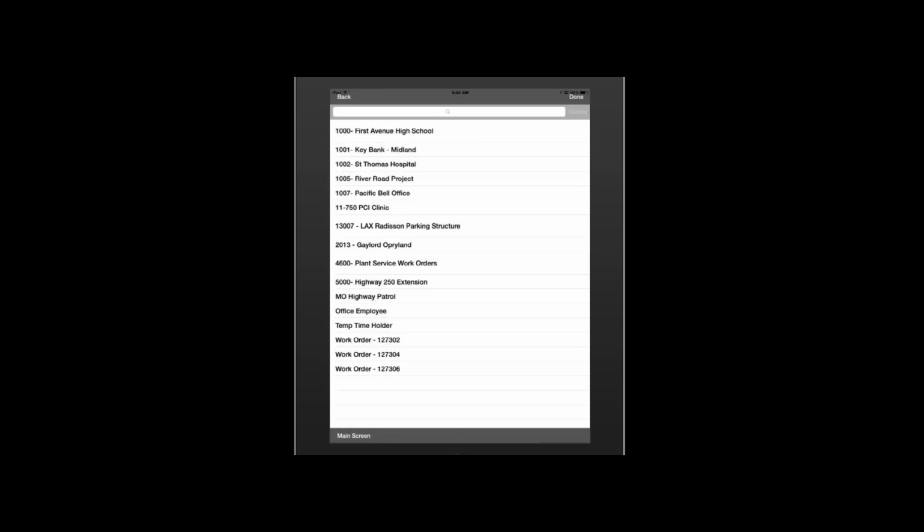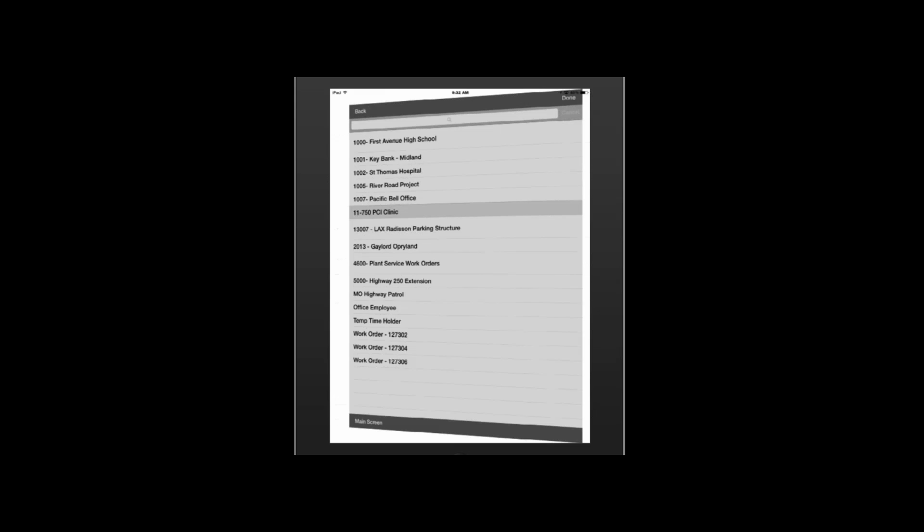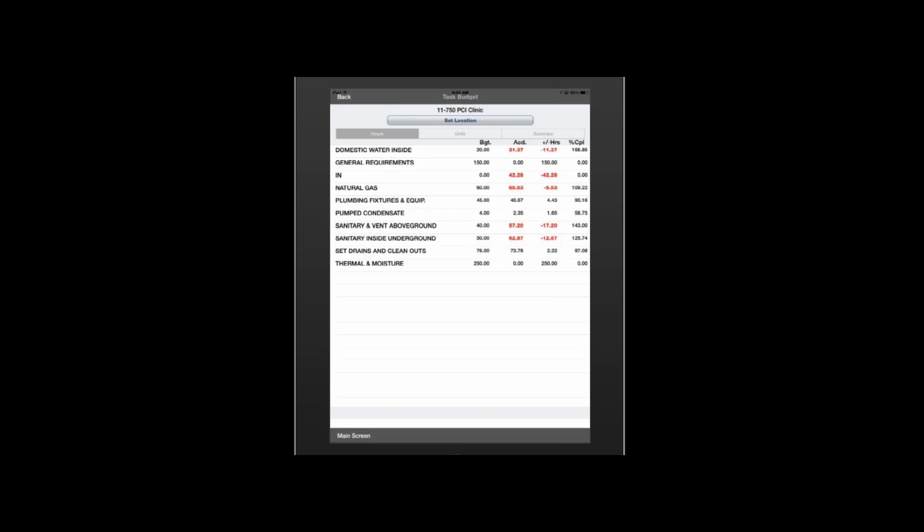I want to see all the jobs that are applicable to me, right? Once again, remember, you can minimize this list specific to this particular individual. I'm going to see the budget versus the actual breakout. We do hours. We're not doing dollars. We're doing hours, and we're doing units. By the way, when you're seeing that red stuff over here, we would have been alerted to this way before we would have gotten to that point, right?